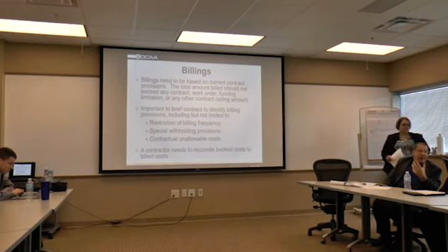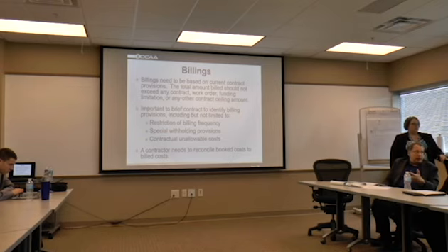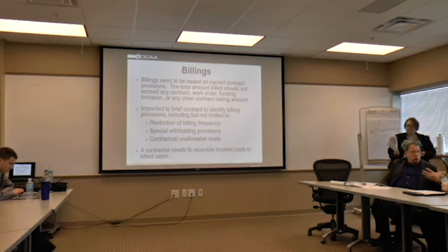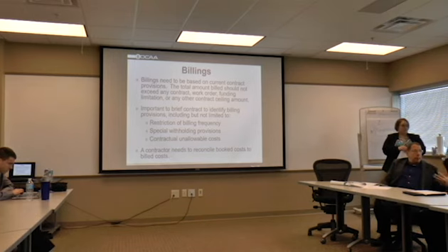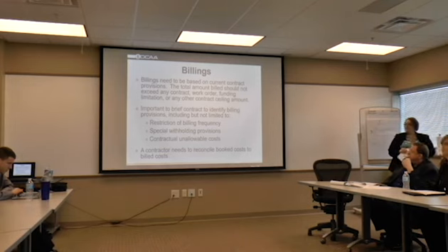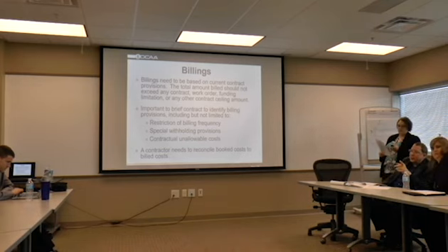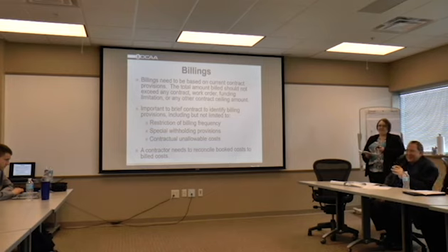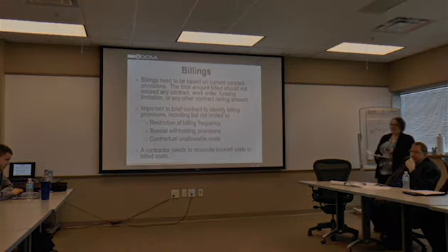So if you're looking at a solicitation and it's talking about particular clauses that may be in the subsequent contract, you might be looking for those clauses addressing billing and see what type of descriptive direction is being provided. Yeah, and I'm pretty sure that FAR clause you referenced speaks to that. I'm thinking it does too, but I haven't read it in a while. FAR 52.216-7, allowable costs and payment. Yeah, I'm pretty sure it speaks to that.